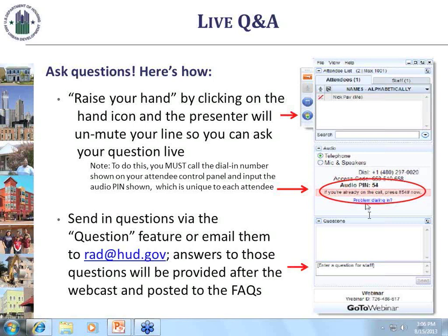Another question: what has been the experience of continuing pilot agreements with local municipalities under RAD? What we found is that the majority of PHAs are continuing with their pilot. Pilot actually goes away as far as a programmatic requirement. Pilot is unique to the public housing program. It stands for payment in lieu of taxes, and in exchange for receiving a public housing program, local governments agree to these reduced tax payments. So for PHAs, it's no longer a program requirement.